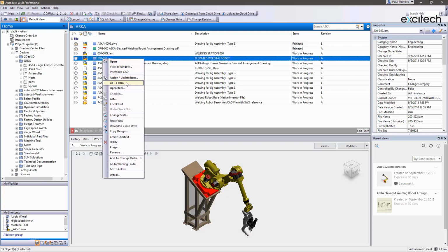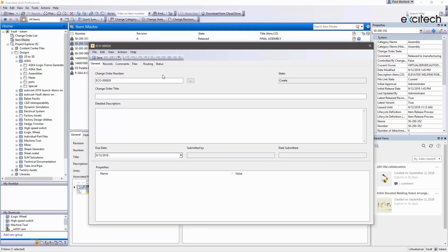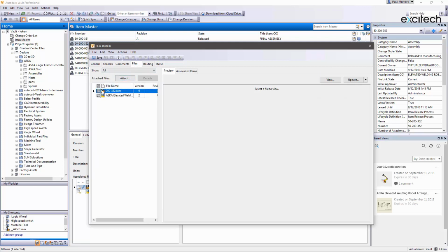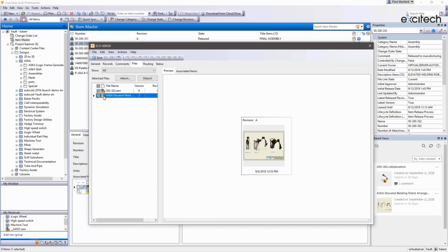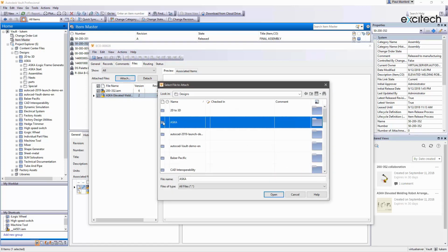Autodesk Vault provides effective and efficient management and tracking of engineering change orders. A change order number is assigned automatically by Vault. You provide a change order title, description, and due date. During the change order process, the design documentation is referenced, and additional documents can be attached. Comments can be added and progress is captured automatically.